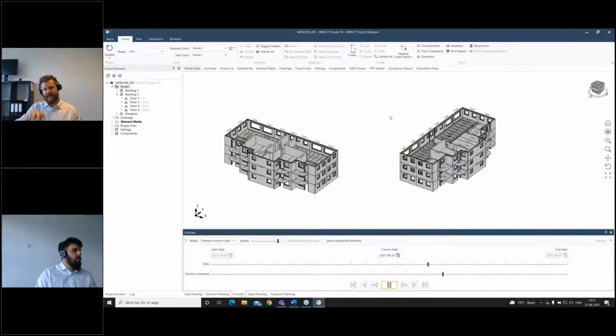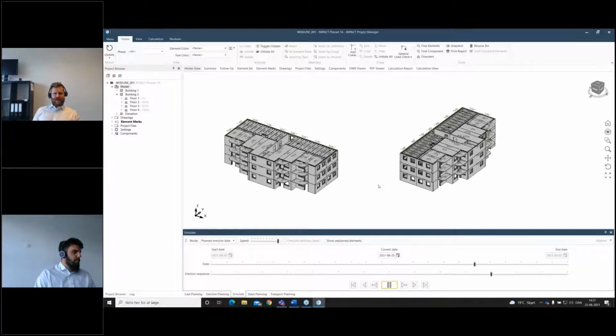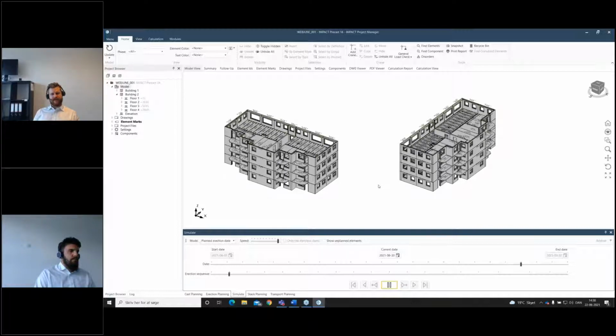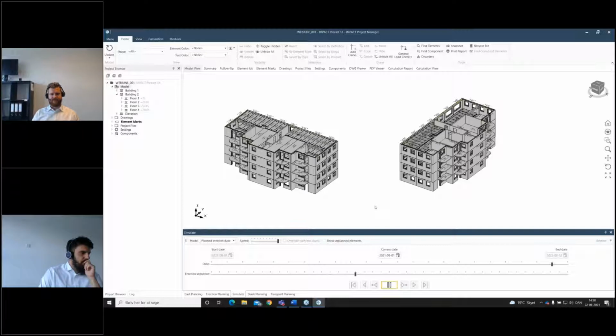But we can see both buildings being set up here, starting from the 2nd of August when we actually started. We're currently at the 24th of August, and we have roughly 3 floors on each building here. We're working on to the 4th floor, the 26th, 27th, jumping to the 30th if you're quick here, meaning we don't want to work in the weekend here in this case as well. And now finishing the 1st of September and the 2nd of September for the last few balcony slabs here. So basically, that is my 2 buildings in this project here.